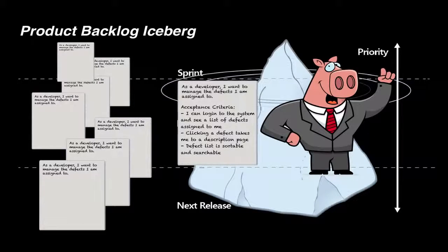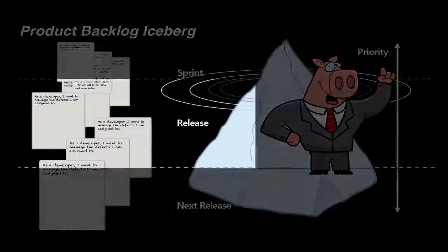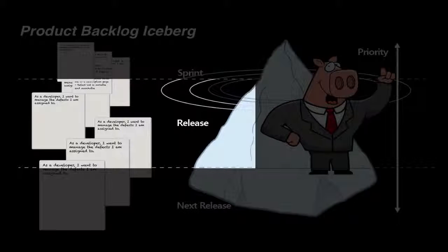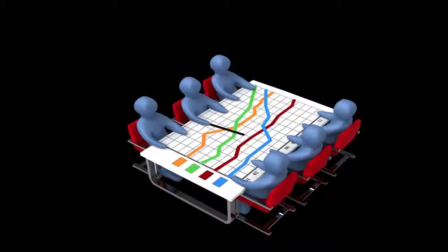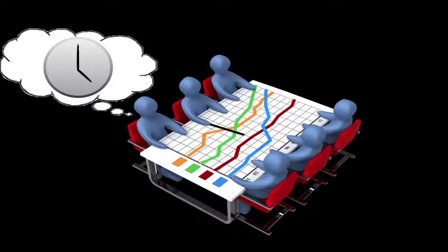Our more precisely defined user stories, usually organized with themes, can then be used by the product owner to create a release backlog. This is a set of features required to build a product with sufficient value to be brought to market. Stories from the release backlog are used during sprint planning meetings to create tasks which will populate our sprint backlog. A task should be no longer than 5 hours of work. This forces the team to carefully consider the design while creating tasks and estimates.